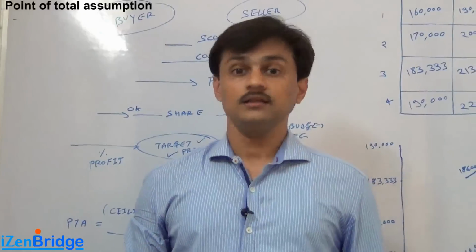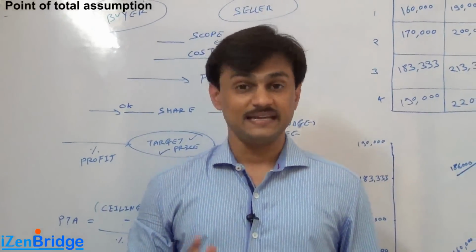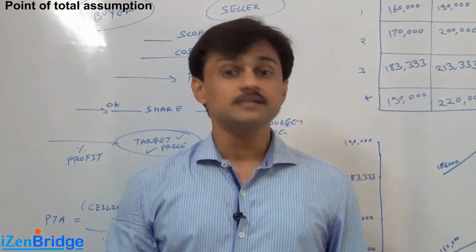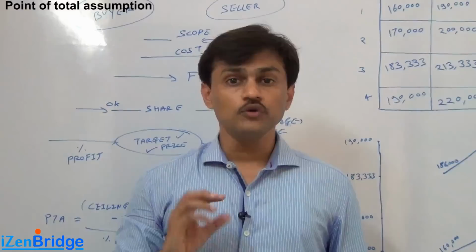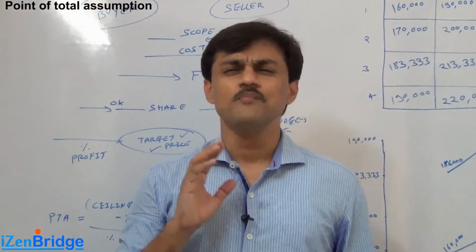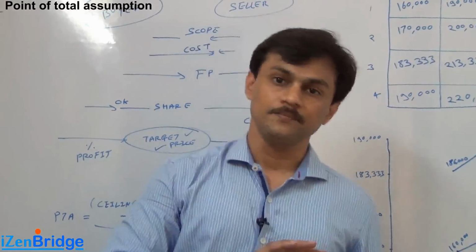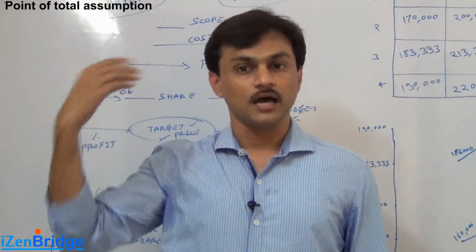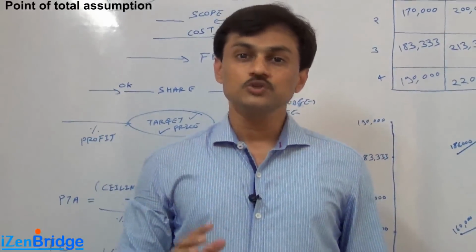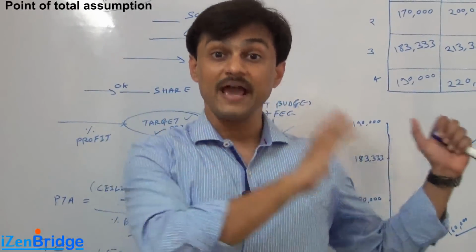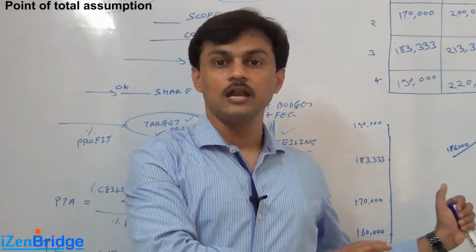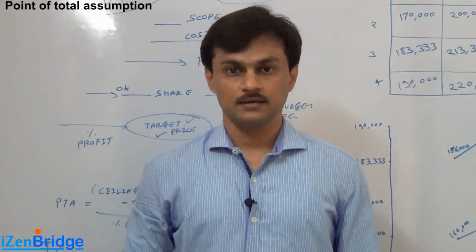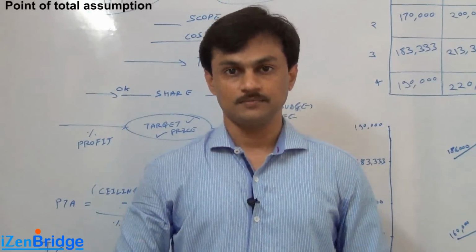I have not seen this particular concept getting tested in the PMP exam very frequently, but still it's an interesting concept, and I would recommend, rather than just memorizing the formula, ceiling price minus target price divided by buyer's ratio plus target cost, it is better to also have a view of the background. And this background will help you to understand the context when such concepts get tested in your PMP exam.